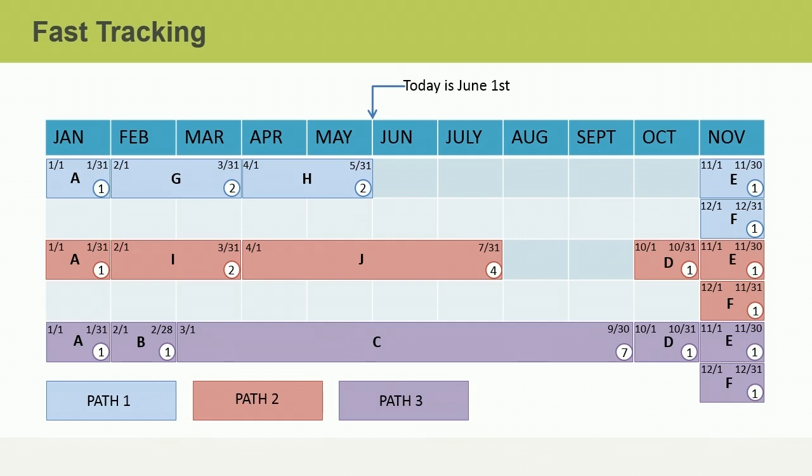If you were thinking about starting activity D before activity C was finished, or performing activity E at the same time as activity D, those are also possible options. Before determining exactly which activities can be fast-tracked, you would review the activity attributes to determine why the dependencies were there in the first place and why the activities were sequenced in this manner. You certainly don't want to ignore a mandatory dependency that was placed there by a key stakeholder.